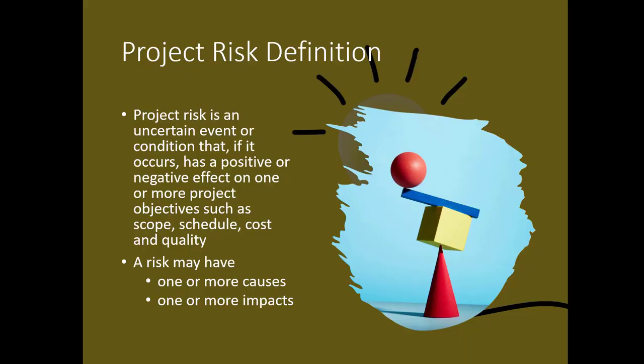So let's start with the definition. A risk is any uncertain event or condition that might affect your project. Key thing here is not all risks are negative. Some events, like finding an easier way to do an activity, or conditions like lowering prices for certain materials, can help your project. When this helps, we call it an opportunity, but it's still handled just like a risk.